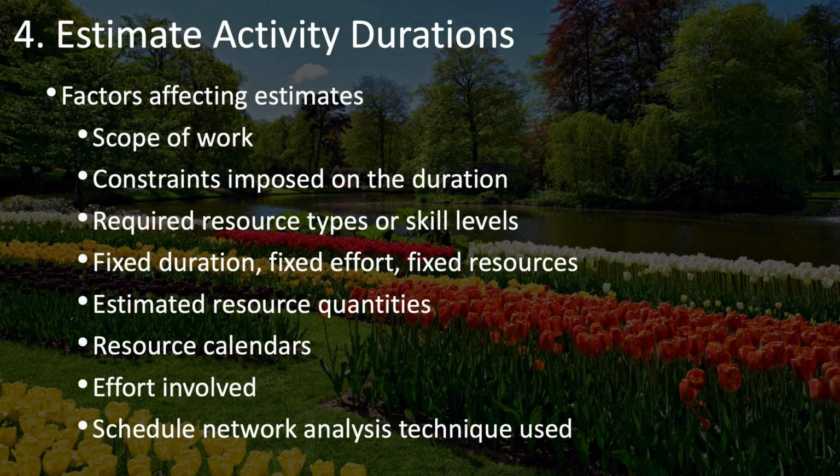You'll need to have a thorough understanding of the scope of work. Looking at the work package and the descriptions of the activities will help you to understand the scope of work. You'll also need to see if there are any constraints that are imposed on the duration. Some of these may be external constraints that you're required to finish something in a certain amount of time, or they may be natural constraints that certain processes take a certain amount of time to complete, no matter what you do.